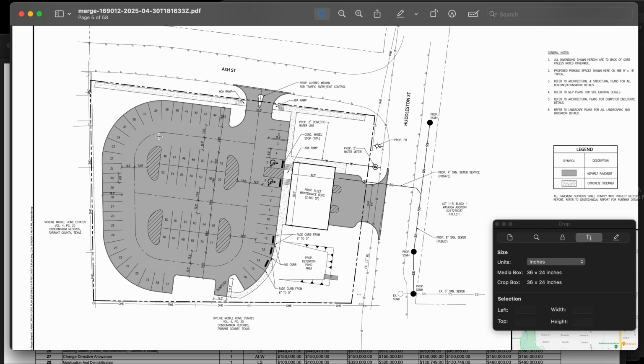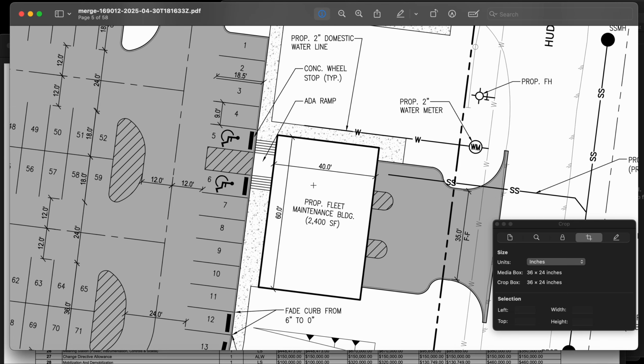Okay. Now we go into the building area next. Remember, we have to export 3 feet of cut, and we have to import 3 feet of fill. Of how big of a size? 40 by 60. But we also go 5 feet out both ways. So in reality, it's 50 by 70.